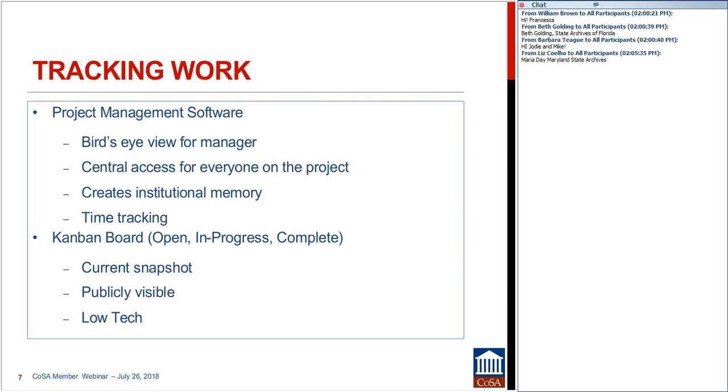And so simply in providing a central repository for all of that information frees us up to do more of the actual work of the project and less of the detail management of the project. One other feature that is common to these project management software is that lots of them allow for time tracking of tasks, so that each staff member could say, I am completing this to-do today, and it took me 20 minutes, and then I worked on this thing for 2 hours, and those sorts of things.